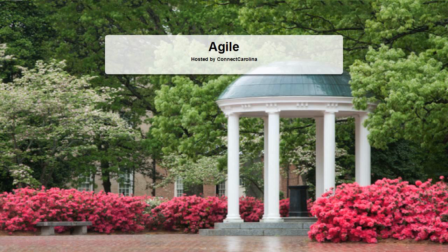If one of those comes up, it's number 1 for the whole team. It doesn't get counted in the work in process. It is all hands on deck till that one's done and out the door. And then you go back. Okay. Hopefully, when that happens, one at a time. But never know.